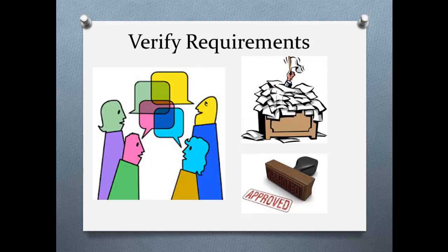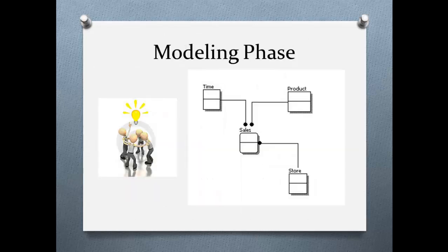In the planning phase, the client or the business allots specific people, two or three people or a group of people, to the vendor. If anything is happening, or any changes or other requirements come up in the middle, we need to get a sign off from the business, to make it official. Once it is official from the business, it moves on to the next phase.